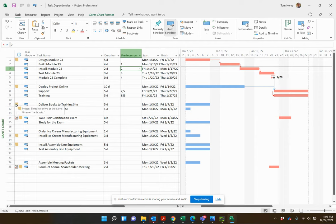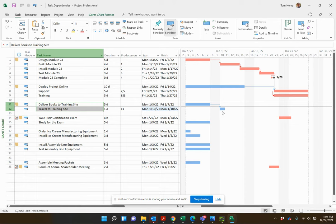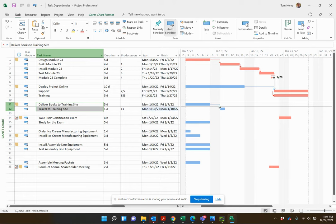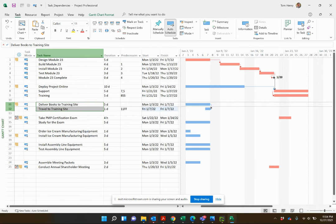Next scenario: deliver books to the training site — I need to arrive at the same time as the books, so we tie the finish dates together. I click on the first task, drag down to the second, and click Link Tasks — giving a finish-to-start by default. I want finish to finish, so I double-click on the link between the two tasks to open the Task Dependency dialog, switch to Finish to Finish, and press OK. The finish dates are now tied together.